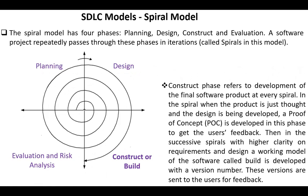In this spiral, when the product is just started and the design is being developed, a proof of concept (POC) is developed in this phase to get the user's feedback. Then, in the successive spirals, with higher clarity on requirements and design, a working model of the software called a build is developed with a version number. These versions are sent to the users for feedback.